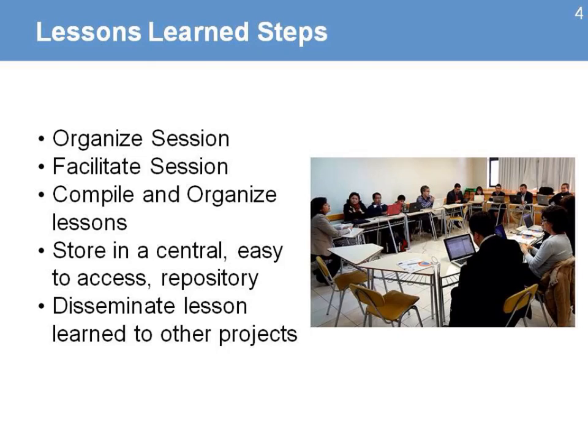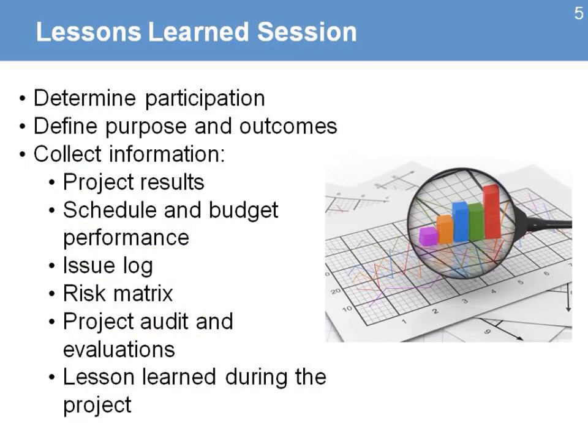We're going to organize a session, defining the agenda and the objectives of the session, and facilitate the session. It could be done by the project manager or an external facilitator. Then compile and organize all the lessons, store them in a central and easy to access repository, and then disseminate the lessons learned to other projects.